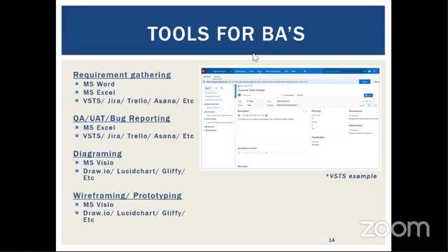And in here, you can open up a particular requirement. You can enter a description, which is the user story. You can enter acceptance criteria, which you see on the screen. And you can start planning within this module which sprint we're going to work on this. You can assign this to a developer. Let's say you have a particular developer on your team that's going to work on this requirement. You can assign that here. You can assign the priorities of it too. We need to do this first before we do other things.